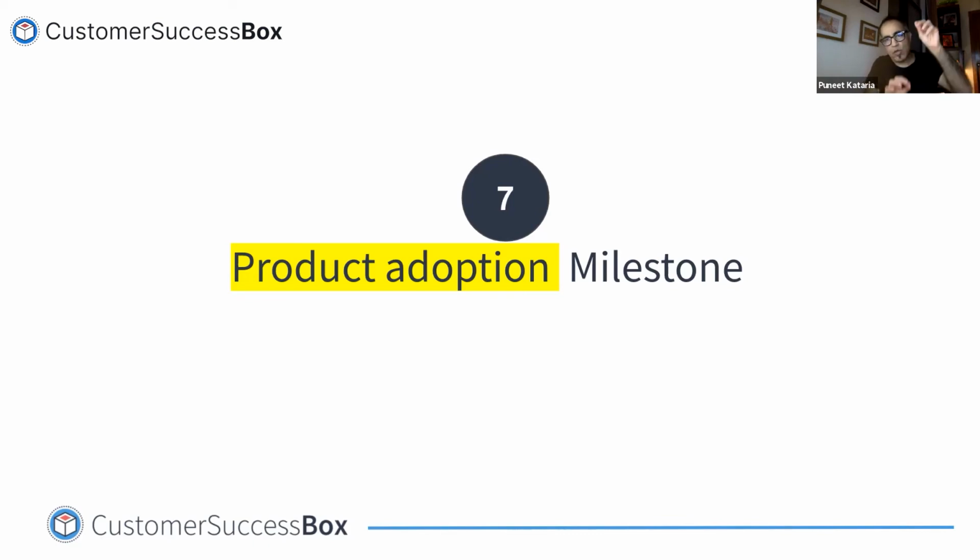Imagine you can break down your product adoption into different steps. For example, the first step, the admin logs in. The second step, they authorize an integration, or integrations 1, 2, and 3, and you can literally name all of them. Number 4, data gets imported. Number 5, new users get invited. Number 6, whatever part of the product, like project management, gets configured, employees get invited, and the old data gets brought in. So these are different parts of the same product.